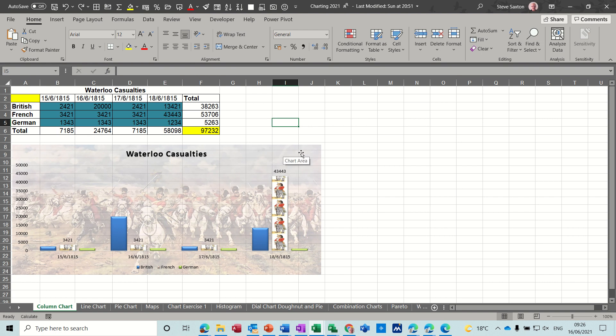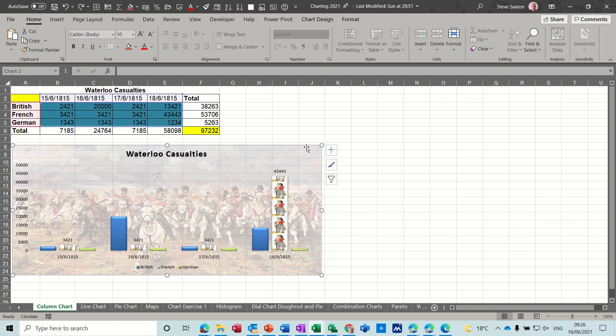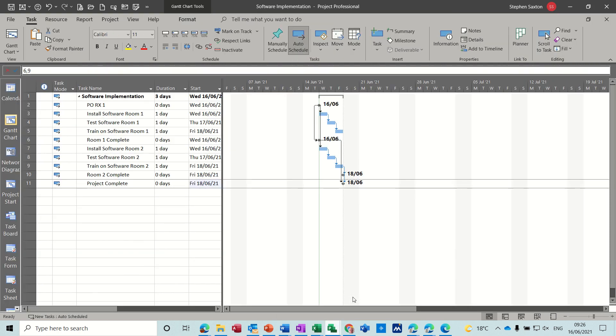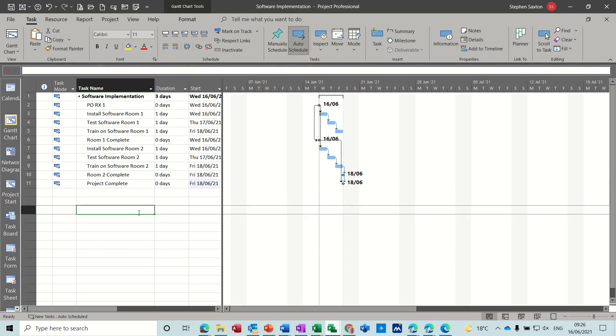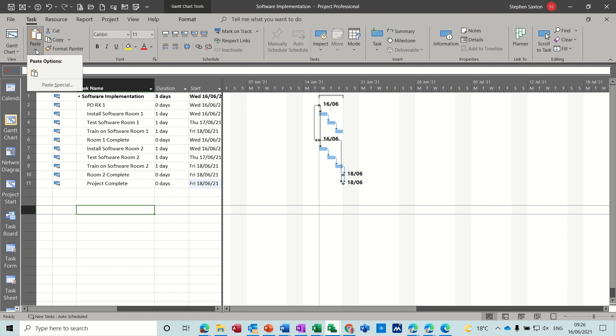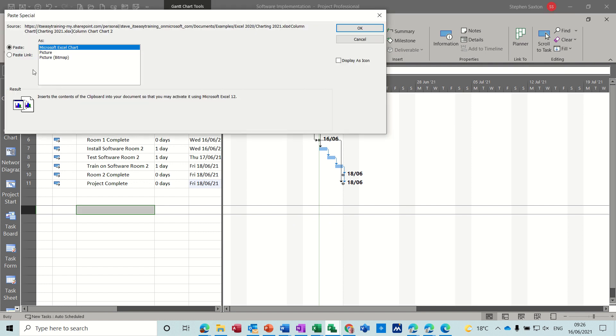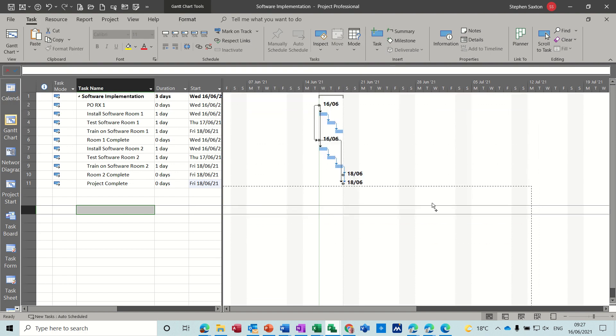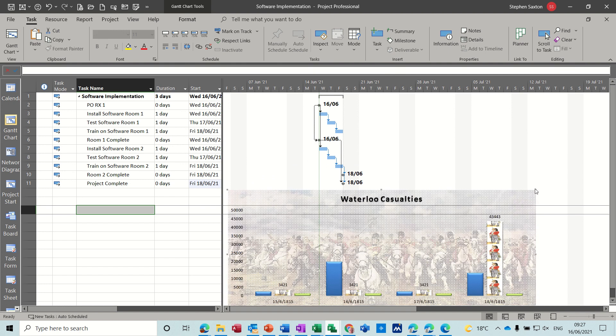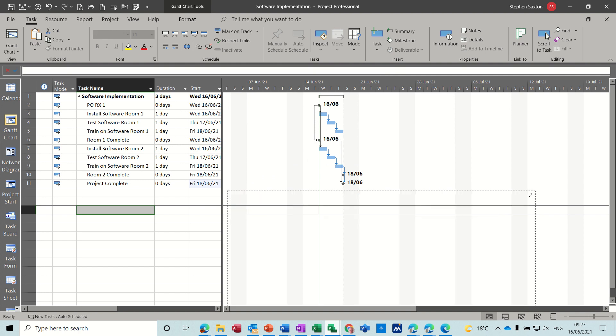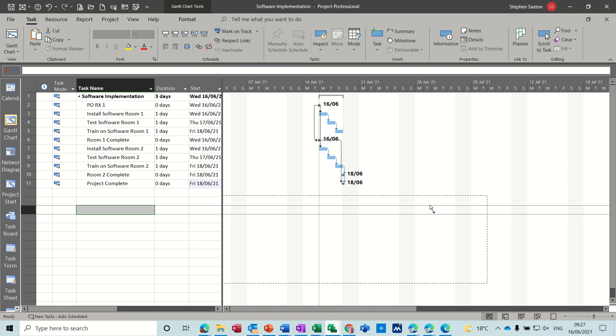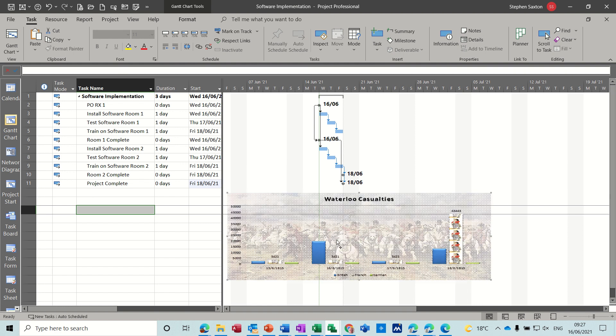Now if you want to bring a chart in, which is what I'm going to do now, is if I click on this, do Control C, and then go back into Project and let's sit in this, this is okay. I'm going to paste that and link it into this Gantt chart view. So you go to the Paste option, Paste Special, Paste Link, and then you've got three options. I'll just leave it as the Excel one. Okay, the graph comes in and you can move that or make it smaller. And this could be like, I know this is not really relevant, casualties, but it's just the process I'm showing you.